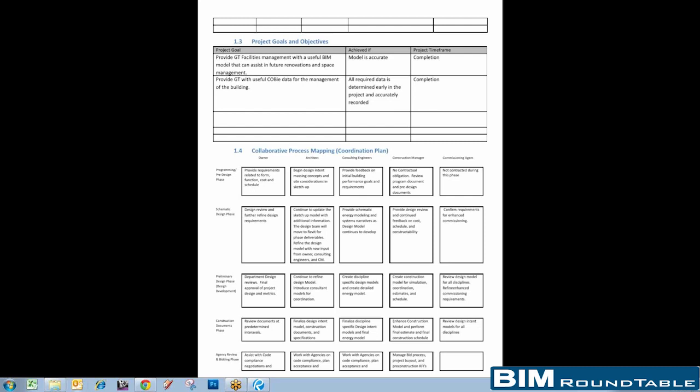Yeah. And the other part that's very good about early involvement is when you're making those decisions, the sub person in the field, if they've been part of the conversation early on, they know what the design intent is. So instead of trying on the fly to make a modification to resolve a 6-inch problem and then ending up causing a 4-foot problem, if they know why that was put there and they understand it, they can make other considerations. They can put more factors into the decision.